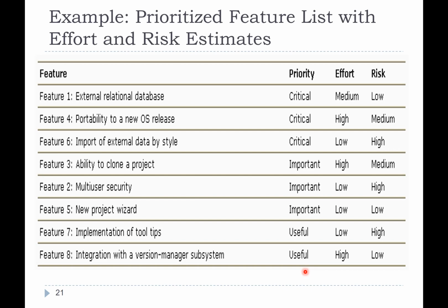So it's not just enough to say how important or not important that feature is, but also the risk factor and also the effort factor. Because effort means more time and more money. And risk is kind of like the surge factor you get on Uber, right? You take that thing and then you multiply by something else. Sometimes it could be in the positive, sometimes it could be in the negative. With Uber, the surge factor is always a positive. But it could have been this X and then you multiply by it depending on the risk. If the risk is low, then maybe 1.1. If the risk is high, it could be multiplied by 5. I mean, it costs you 5 times as much to actually end up doing it. So this is kind of what you need to watch out for.